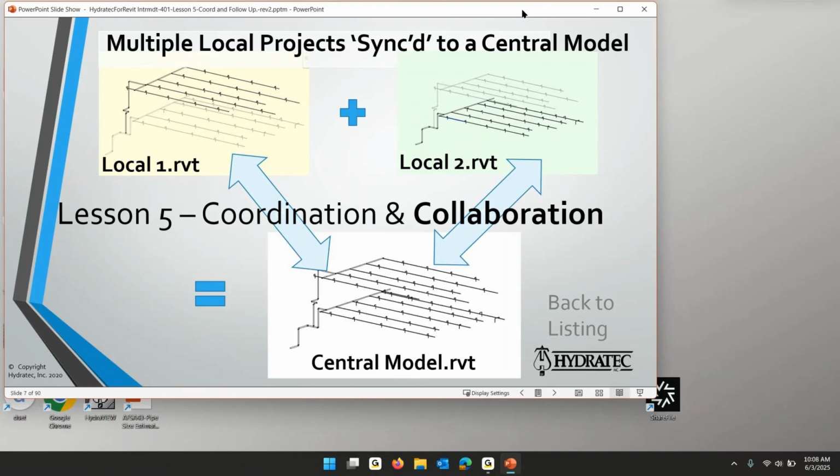Sometimes it's been provided by the general contractor. Sometimes he just says, if you want to work on this job, you have to have that subscription. I'll warn you ahead of time. That's about $1,000 a year per seat. So if you want to warn your salespeople that's a cost that may be built into their estimate, they may want to make sure they build that in.